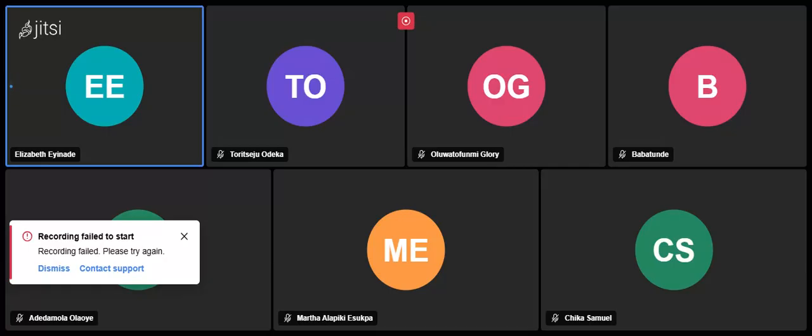Now, in your backlog, the next thing will be forget password. According to the way you have prioritized it, that's the same way you now move it to the sprint, except there are needs. Maybe you've tested or you've pushed that particular feature to do and have better testing, and something changes, there needs to be a modification or improvement. That's when that will now affect the scope of your sprint. So because you said your next thing should be forget password, you now notice that the login page is showing error. So that's a fix.